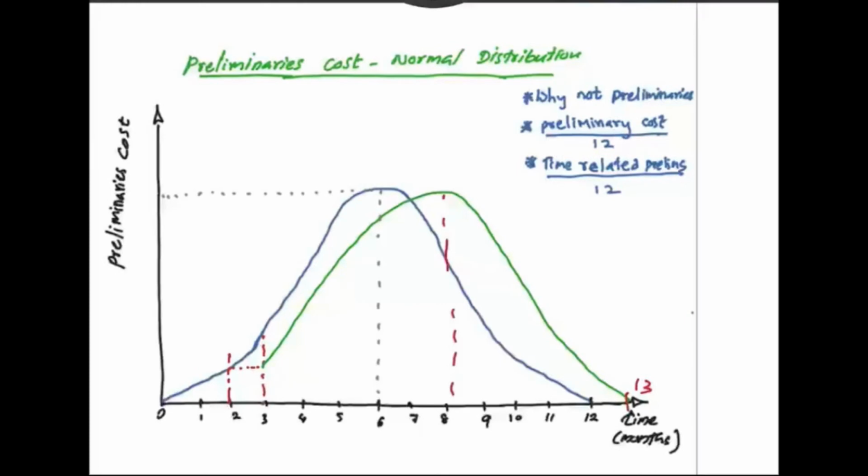Now let's see why we cannot take the preliminaries into the prolongation assessment. Preliminary prices are entered by the contractor when he gets the BOQ to price in the tender. At that time, he has considered many of the factors and risk items in the price.